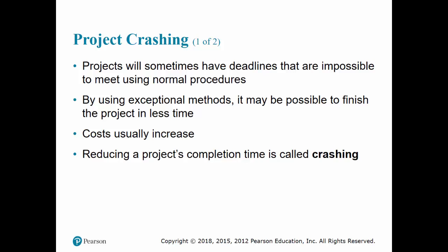Now let's look at project crashing. So project crashing, remember, is time reduction. When you have activities that can be completed faster than normal by spending more money, that process is called crashing. Is it beneficial to spend money on some activities, thus reducing the project completion time? Is there savings that will allow us to do that? Okay, so that's the idea.